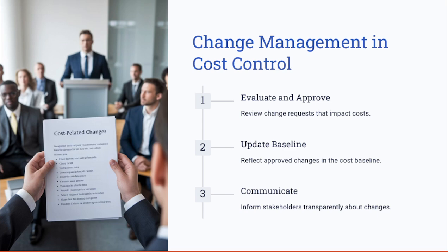Also, in case you have followed the change management and cost control, after you evaluate and get the approval on the change request, you need to update the cost baseline to reflect the approved changes. The most important thing here is to communicate these changes in the cost baseline to the stakeholders transparently, with the justified reasons.